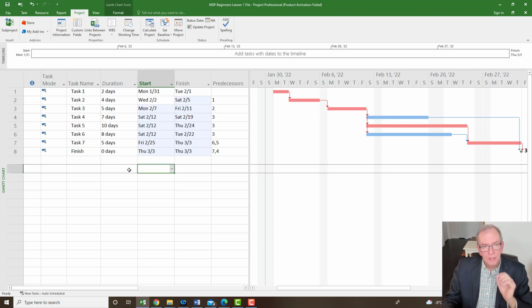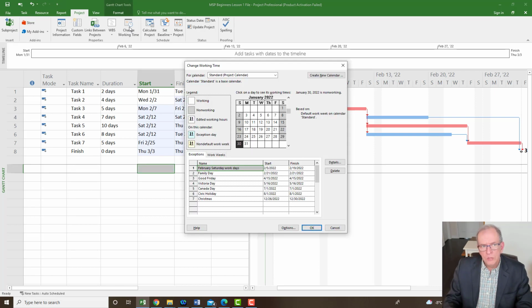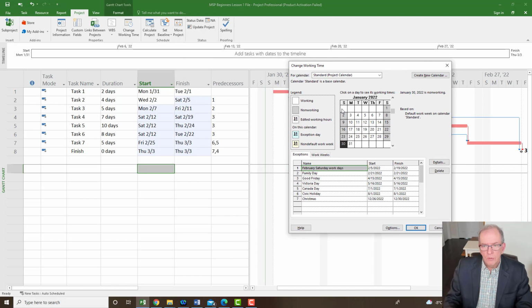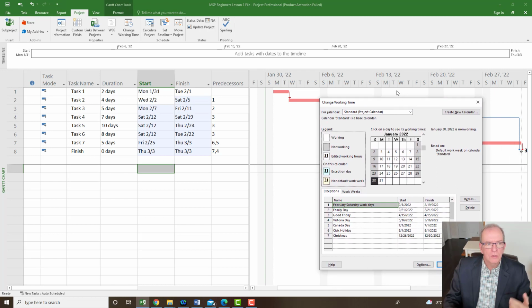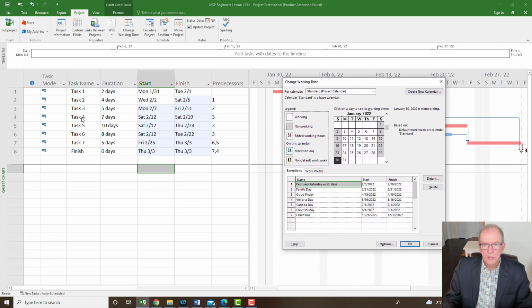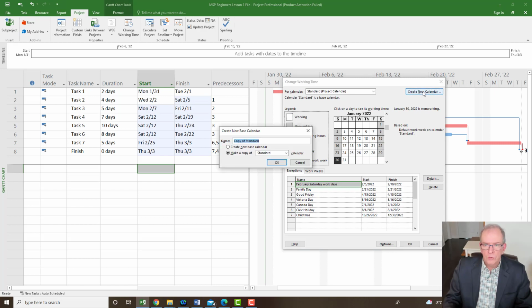The last thing I want to cover in this video is if you want to create a special calendar. So you can go to Change Working Time, and say task 4 has a special calendar. For example, if you had an electrician and this was electrical work, and you wanted to put a special calendar on that particular trade. Well, you've got to create that special calendar. So we're going to create a new calendar. Why don't we call it Electrician, so we can identify the electrical sub trade.